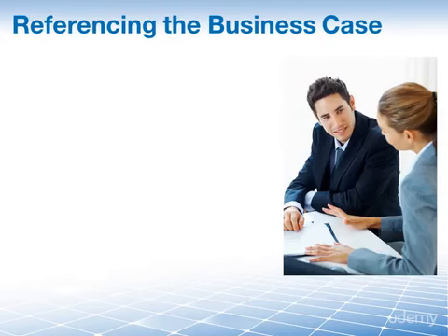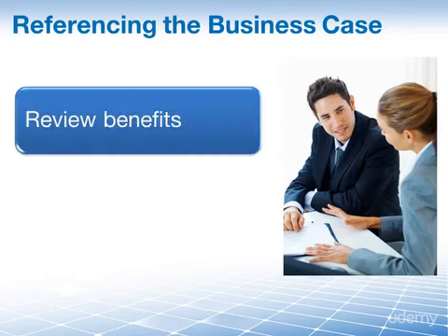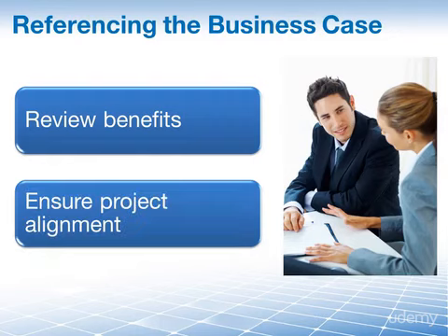In addition to using the business case as part of your project selection process, after the project is started, the business case continues to serve as a reference document. The business case needs to be revisited periodically as you are executing your project. The project manager and the project sponsor should look closely at the benefits and the goals that are described in the business case to ensure alignment with the project objectives and goals. They want to validate that the project is on track to deliver the anticipated benefits and results as they are stated in the business case.